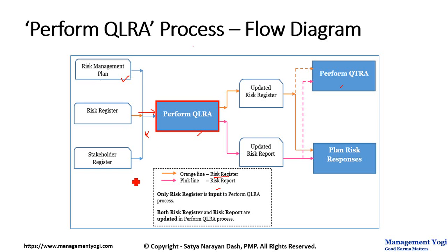Then you have the stakeholder register. It is an input because the stakeholders are going to be confirmed as the risk owners. That is one of the reasons it is acting as an input to the Perform QLRA process.